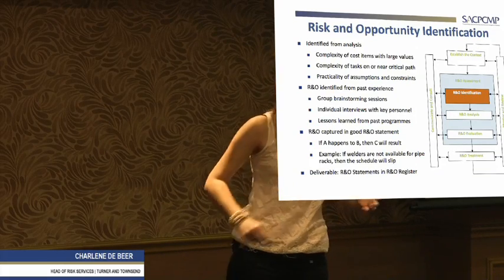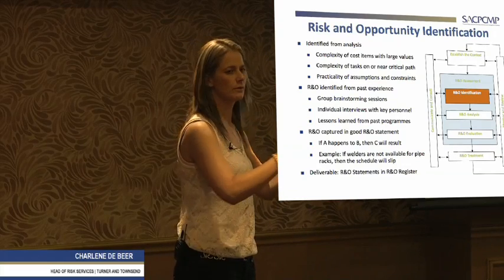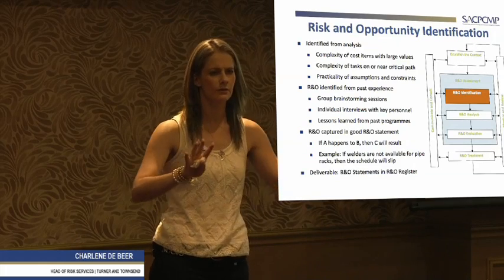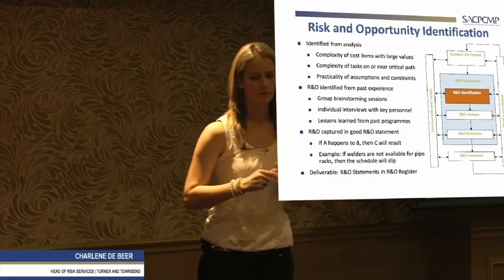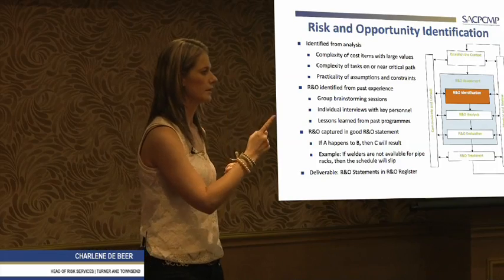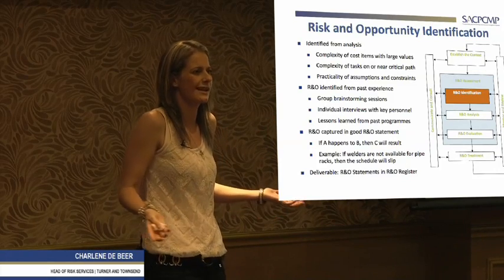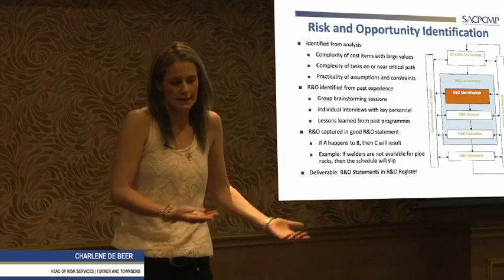And I'll hand these out to the guys around the table, and I'll say, I'll give you 20 minutes. I want you to tell me what do you think is the top 3 risks to this project. Whether it's cost, schedule, I don't want to know the consequence, I want to know what do you think is the biggest risk on the project. Then at least, firstly, you're getting everybody's inputs, because some guys tend to be more quiet than the others. So sometimes a guy never gets to say it, maybe he's got the 3 biggest risks and nobody else is going to identify it.